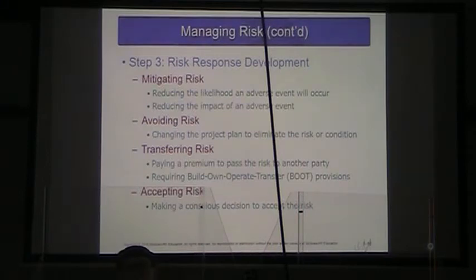The second is avoiding risk. Change the project plan to eliminate the risk or condition. Of course, some things can't be eliminated. We can transfer the risk.